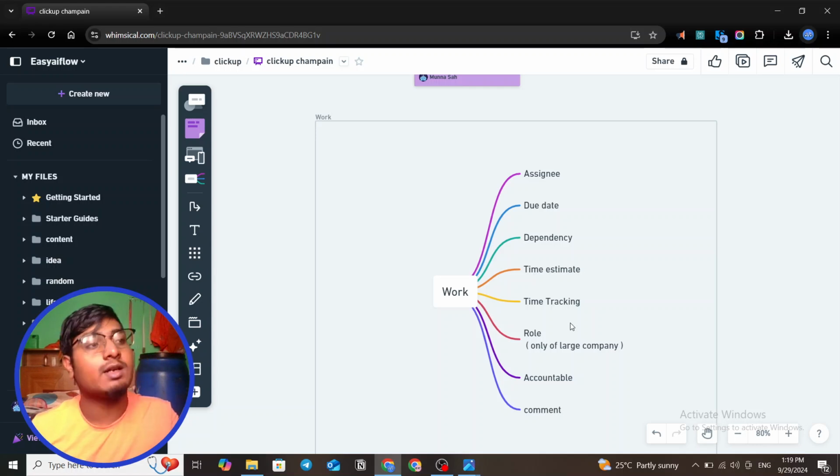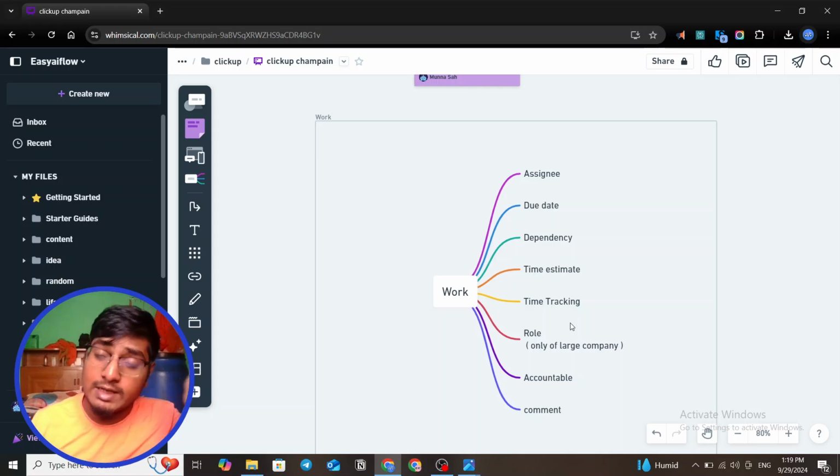Say I estimate that scripting takes 1 day, 8 hours. How much time does the employee take? It takes 9 hours, it takes 10 hours. Then the CEO or account manager decides, okay, it generally takes 10 hours. So after that we estimate 10 hours for scripting.